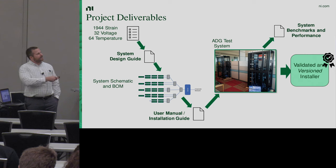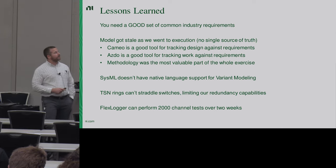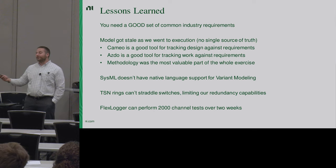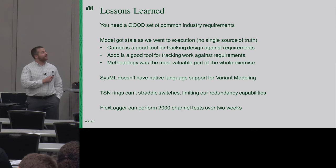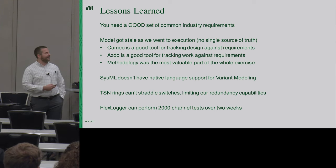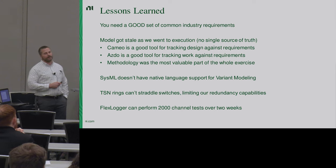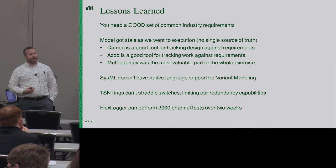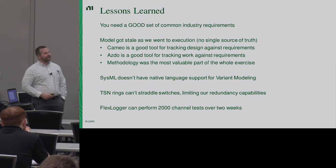As far as lessons learned: the hardest part of this project is getting a good set of common industry requirements — not too specific so only one or two customers benefit, but not so general that nothing is useful. The model-based systems engineering methodology for decomposing the system was extremely valuable — it brought structure to the chaos. We were disciplined early about making the model, but when we transitioned to execution it became very difficult to keep the model fresh. I need two things to track: my design against my requirements, and my requirements against the work happening on my engineering team. Cameo is good at the first, but we used Azure DevOps to track work items, and they don't integrate well.